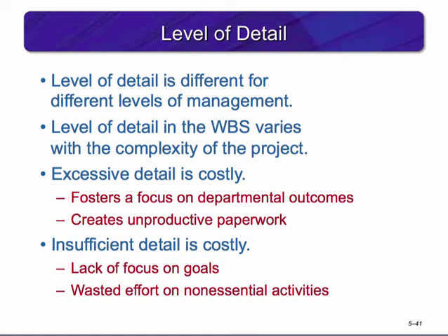First, excessive detail is expensive. It creates unnecessary paperwork and focuses on departmental outcomes rather than the teamwork required across all departments. Second, insufficient detail is costly. It generates a lack of focus on the project goals and commits a wasted effort on non-essential activities.